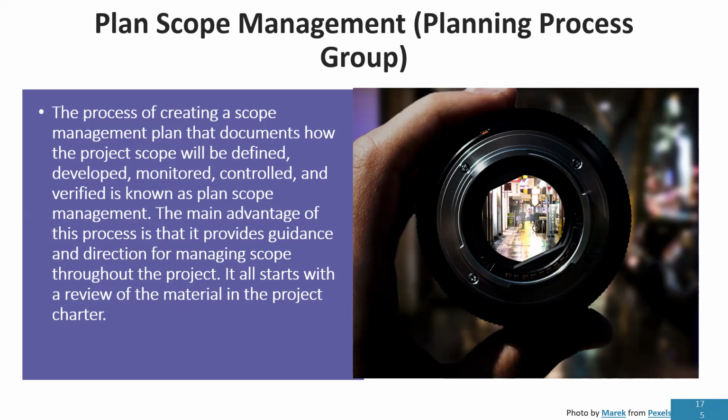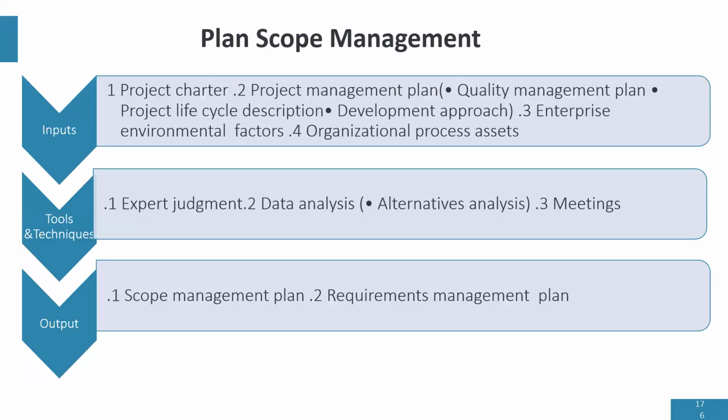This is what you need. If someone asks you for a scope management plan, you'll see that the scope management plan will describe everything in the scope, under the scope knowledge area, including how you create the WBS, including how you make changes, who has a right to request scope changes in the project, and the process of controlling changes, everything in the scope management plan. So that's why we start with this process.